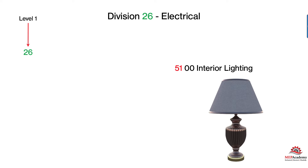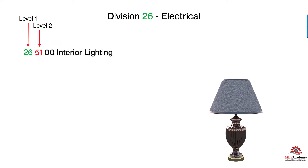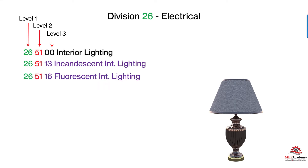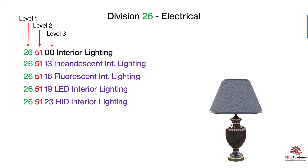Division 26, Electrical — Level 1 is your Division. If we want to talk about Interior Lighting, that's the second level — Category 51. But there's more to Interior Lighting than just that, so it gets broken down in Level 3, which is your third set of numbers: Incandescent, Fluorescent, LED, and HID Interior Lighting. Level 1 is always your Division — in this case 26 Electrical. Level 2 is defining Interior Lighting. And Level 3 defines it even further because there's more than one type.